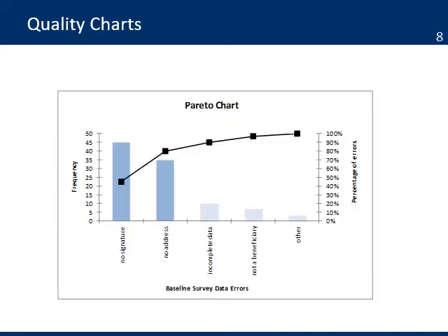A chart can significantly help identify problem areas. One of the charts used in quality management is called the Pareto Chart. This chart graphs the areas where quality problems exist and organizes them by frequency. The chart receives its name from the Pareto principle, which states that 80% of the quality consequences results from 20% of the causes.